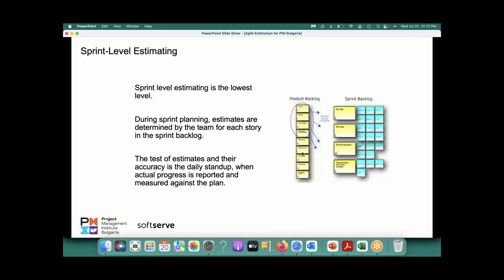So if I'm doing it, I don't have to get into breaking it into tasks and trying to track that. I don't have to do it. But in reality, this doesn't happen. In reality, different people will work on different pieces of a user story, like these kind of activities. So you divide them into tasks, and then you estimate tasks.